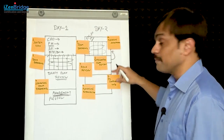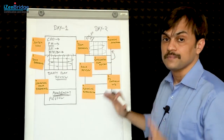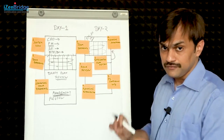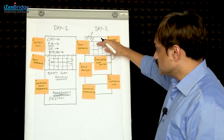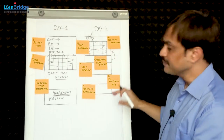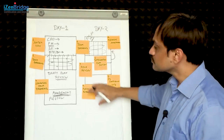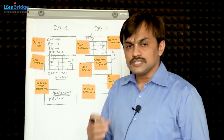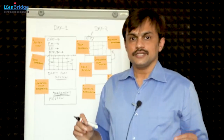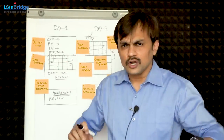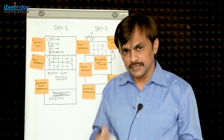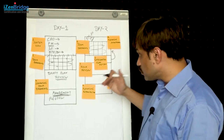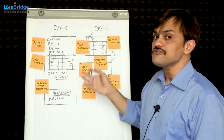There could be some cases where problems may get resolved without a breakout room as well. But we need to have an integrated plan which is acceptable to the business and which comes from the development team where they feel good enough to work with it. Assuming by doing a few iterations we achieved an integrated plan which is reviewed, then we talk about risks. While we were doing team-level planning, we do identify various risks and come up with possible approaches for those risks. The focus of risk here is more to do with risk on a given PI - we are not talking about global risk and business risks, we are primarily focusing on what things can derail our PI plan.